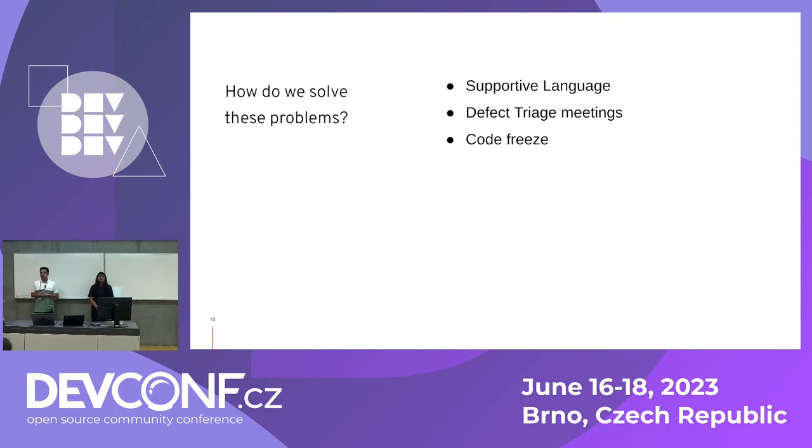And the code freeze, it's very important, guys. A tester is a human. He doesn't test each and every part of the app. If we are pushing our code till the end, like we have the production release tomorrow and we are pushing code right now, how will the tester test every part? They need to test regression on every part. We have automation now, but we still need to do some manual testing also. What we follow is a production push every 4 weeks. For 3 weeks we push our changes to the testing environment. In the last week we give the full week to the tester to test each and every part. If they find any critical issue, we just fix it and push it to the testing environment.